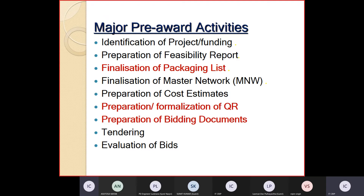In association with the RNDCs. My part is basically the finalization of packages, how it is done, and the preparation of QR and the bidding document, mainly the technical specification. Once the project is identified based on system studies and other concepts, a feasibility report or DPR is required.